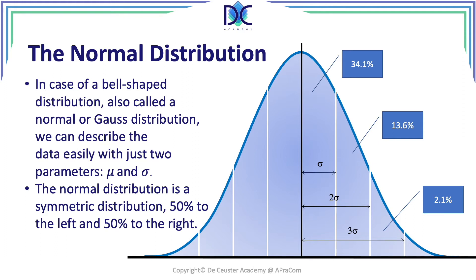Between one sigma and two sigma we find 13.6 percent, and between two and three sigma we find 2.1 percent. It means that from the average plus one sigma at the left-hand side we have 84.1 percent, and 15.9 percent to the right of the average plus one standard deviation.